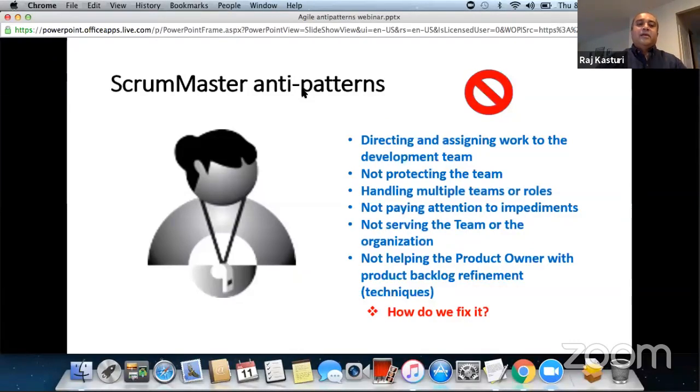For example, let's say the team is doing their work in the sprint and they try to overcommit to the work during sprint planning. That's when the Scrum Master can ensure that they don't overcommit and that they're reasonable. It's not that the Scrum Master is telling them, but the Scrum Master is ensuring that they understand, or at least telling them, hey, you may be overcommitting.